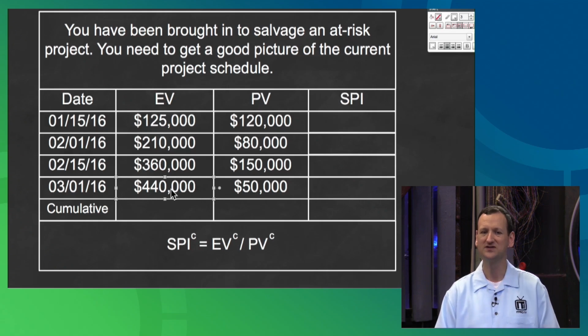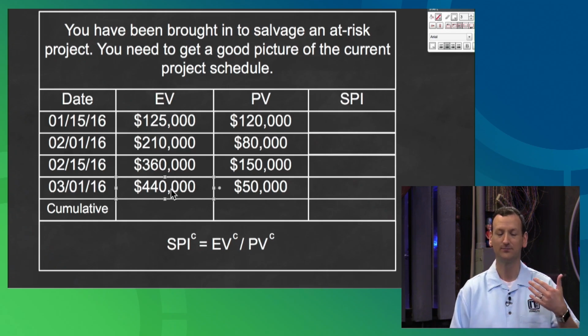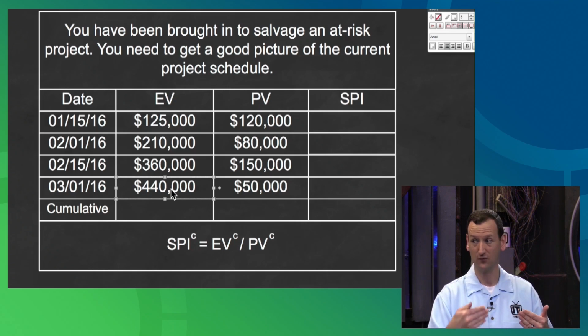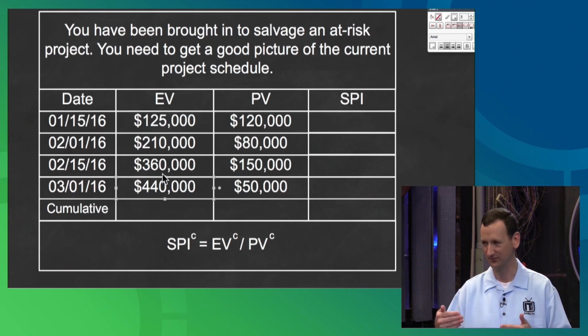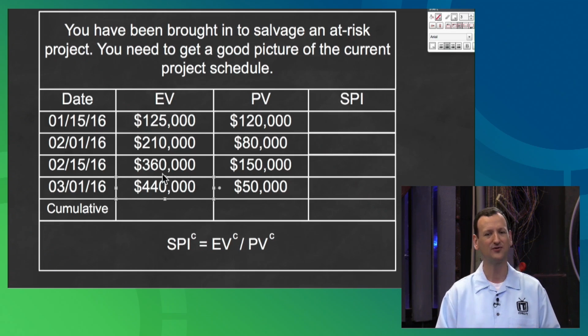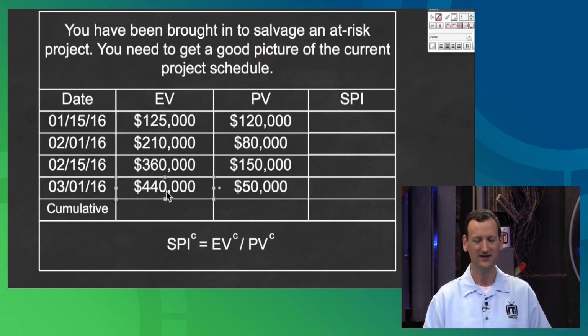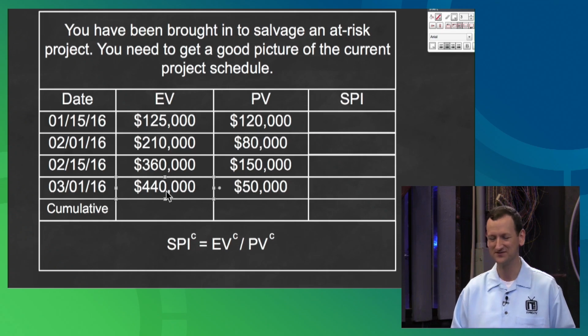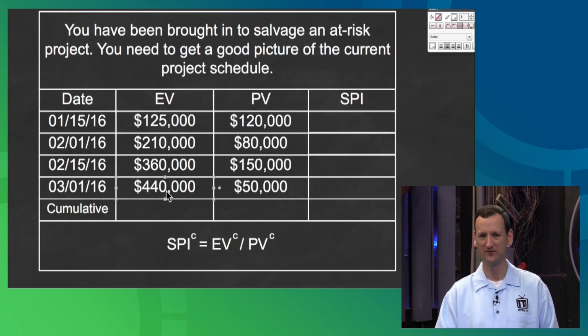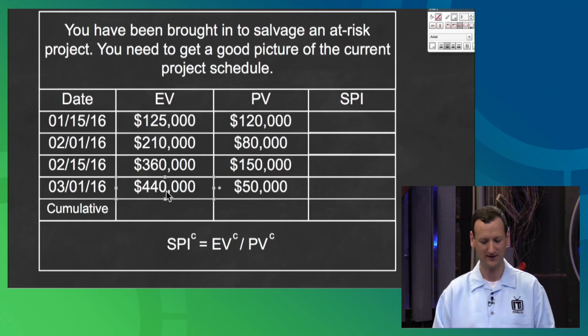All right. And the reason is, with earned value, you're taking your planned value and you're multiplying it by a percentage of work. And I don't necessarily know what that percentage of work was. There's two variables that are in the mix that kind of throw things off. Well, I might have my planned value over here, and I can use that, but I still have this other variable, and I have to do a lot of work to convert it. And so it can be done in some scenarios, but in the exam, the answer would normally be not enough information provided, right? That these are not compatible.